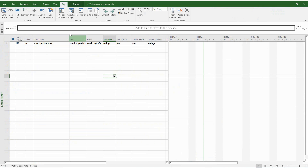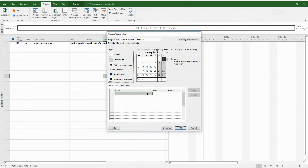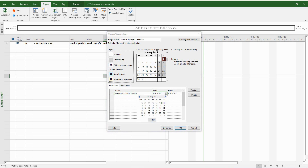Please pay close attention to all the steps that I'll be carrying out on screen. I'm going to start by modifying the calendar — this is something you need to learn how to do as well. Sometimes a weekend could be a working day, so in this particular example, three days which fall on the weekend have to be converted to working days. Keep a close watch on what I'm doing on screen and you will be able to replicate the procedure without any problems whatsoever.